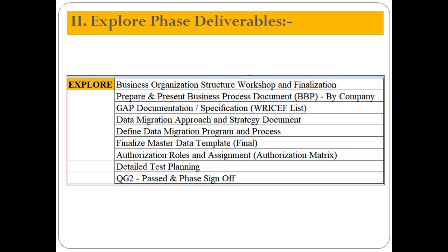What is a fit to standard workshop? Based on SAP best practices, we have to prepare the fit to standard workshop PowerPoint presentation document. We identified the MM module has 35 processes. We identified the SD module has 30 processes. We identified the PP module has 25 processes. We identified the FICO module has 40 processes. For these 40 processes, we need to prepare the fit to standard workshop document.